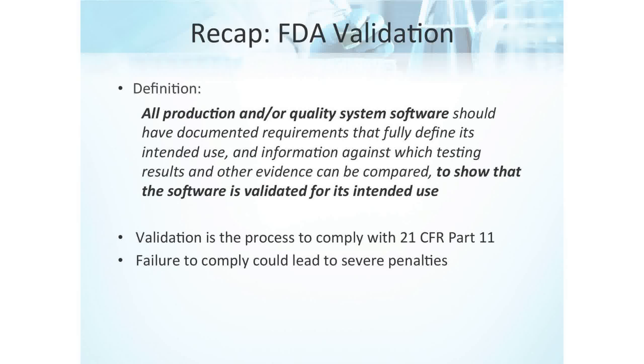So the law, FDA, 21 CFR 11, is written on what's expected of computer system validation, but it definitely does not address the how. How you do that is going to be up to your quality organization, your company, and their interpretation of what this law means. But just note that for most computer systems, it will be absolutely impossible to exhaustively test every path that's possible in the source code. It's just mathematically not possible. So what has to happen is that you first assess your risk, and you try to minimize that risk by producing high quality data supporting the testing and the minimization of risk where it makes the most sense.